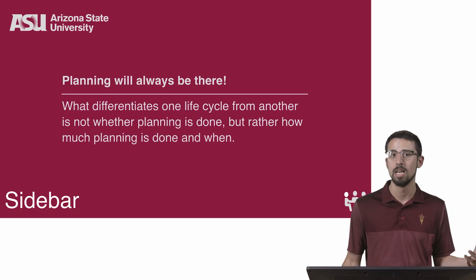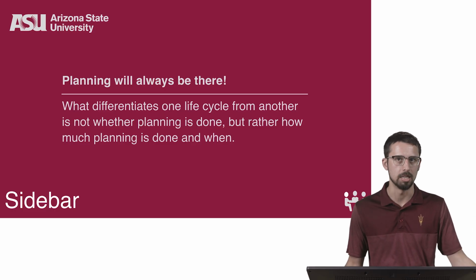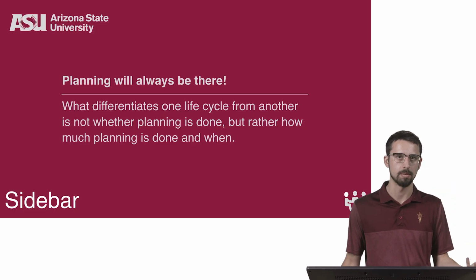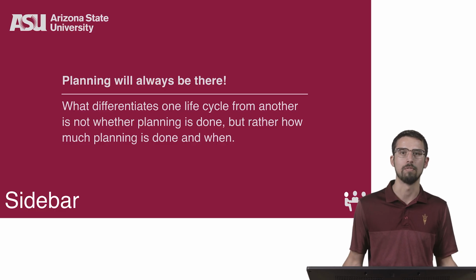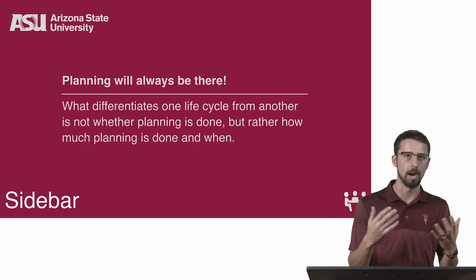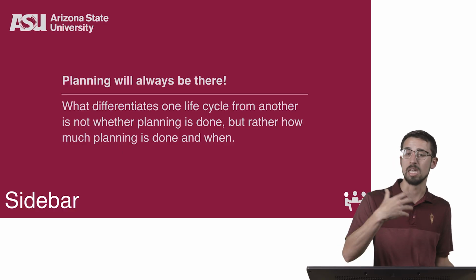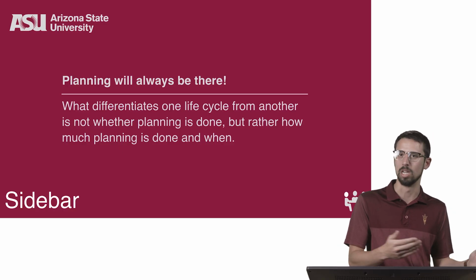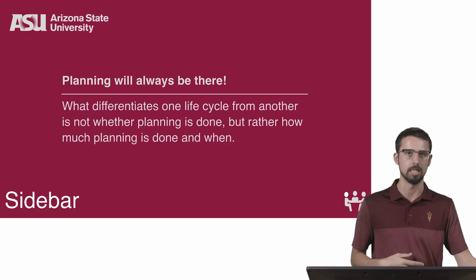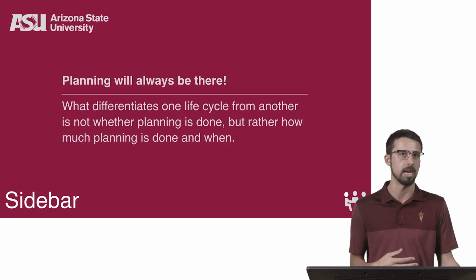In contrast, at the sequential end of the continuum, the plan drives the work. As much planning as possible is performed up front. Requirements are identified in as much detail as possible. The team estimates when they can deliver which deliverables and performs comprehensive procurement activities at those times.